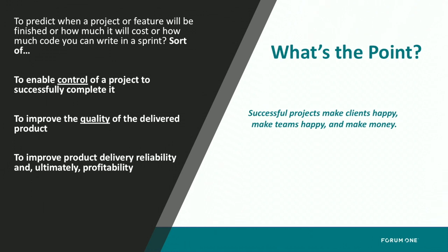In addition, estimation really enables us to improve the quality of a delivered project. If you underestimate, and this is exactly what happens for me a lot of the time, I underestimate a feature or a sprint, and my project manager says, "That's great, but you still have to complete what you said you were going to complete, what you estimated you were going to complete in the time given." And basically what that means is I code faster and my technical debt goes up. So the better we are at estimating, the lower the technical debt by the time we get to the end of the project. Technical debt is the junk we put in code, the poor coding practices that get baked into a project.